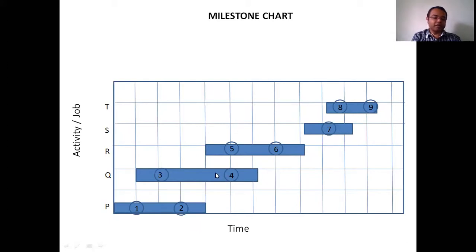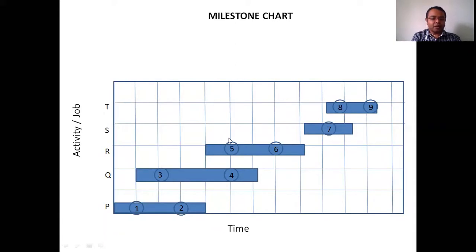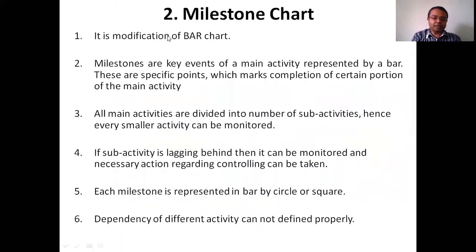Within a single activity like Q, you can show the dependency or sequence — to reach the fourth milestone, you must reach the third milestone first. But in the case of milestones four and five starting simultaneously across different activities R and Q, it doesn't show any dependency between them. It doesn't mean that five is dependent upon four. So in the milestone chart, dependency of different activities across different bars cannot be shown properly — and this is again one of the key disadvantages of the milestone chart.